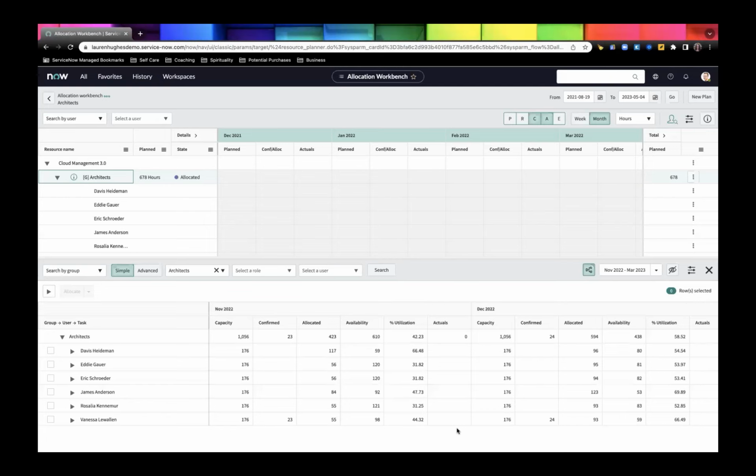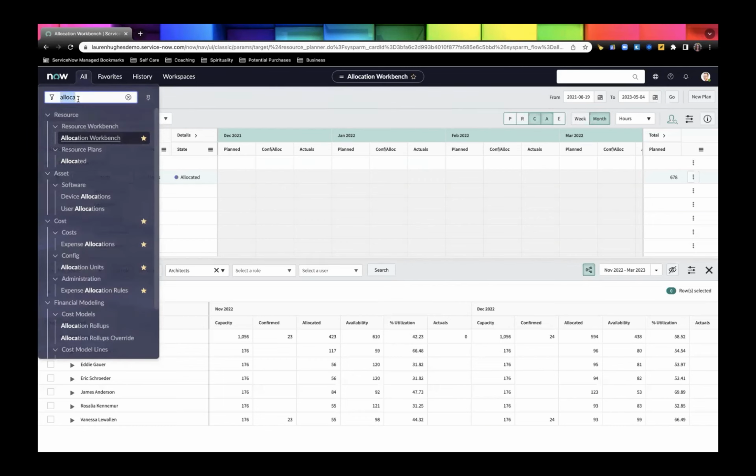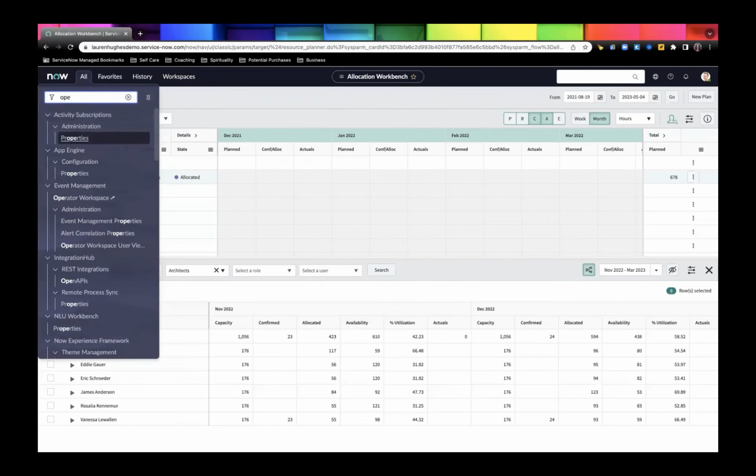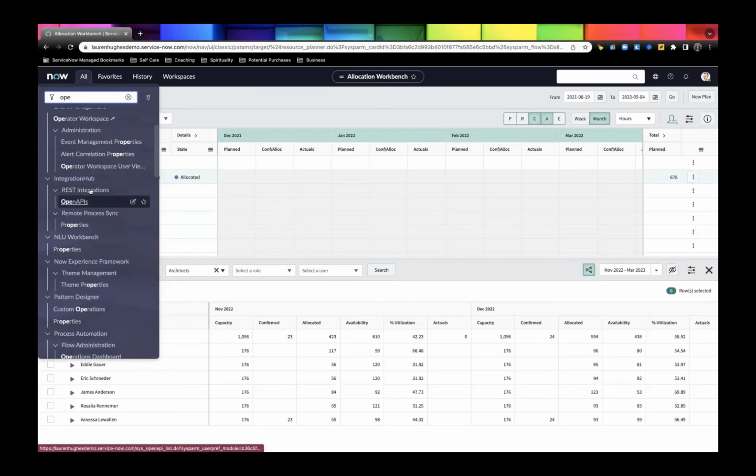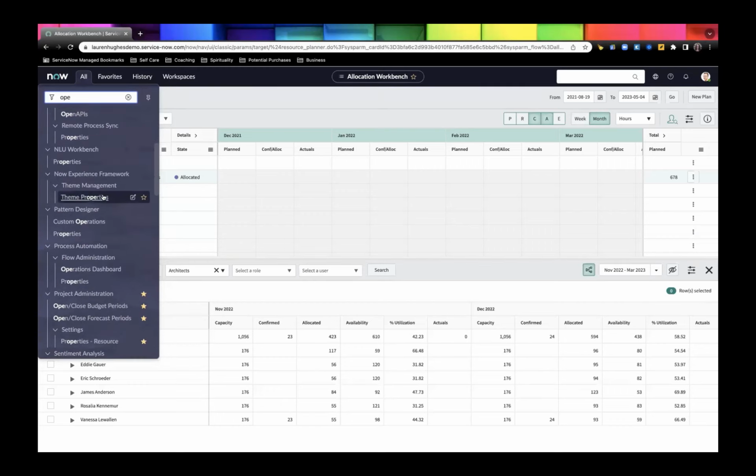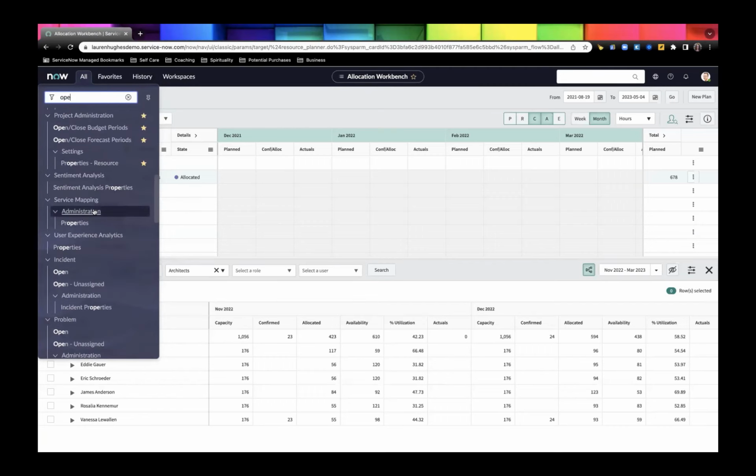There's also another option, operational plans. You can create an operational plan and it'll remove that time from that person's capacity. It'll reduce their availability by number of hours, percentage, whatever. Yeah, and actually you can also book time against operational work on operational resource events, if you want to track all the actual hours as well. Okay, thank you.